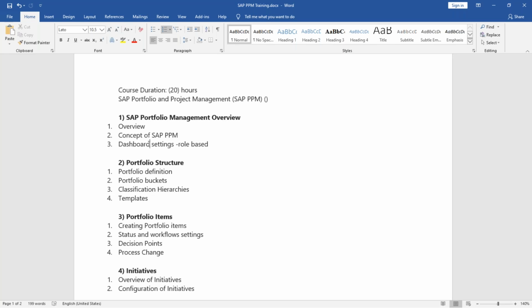In PS, basically, the capacity planning is the basic concept. You can correct me afterwards whether you will cover the same in PPM or not. What happens is you create the work centers where you assign all your resources, the entire team, and where you maintain the capacity planning profile, how an employee is distributed over the work center.